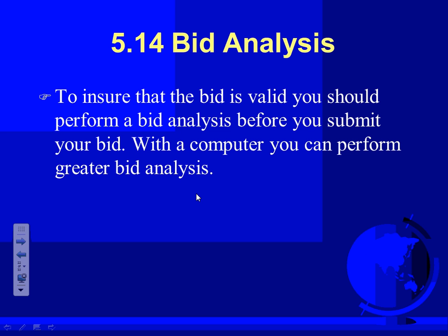Dollar per square foot is a major thing with bid analysis. The sheet that you guys have with us here takes the dollar per square foot, the percentage of the labor, the percentage of the material. At least you need the percentage of the labor, the percentage of the material, and the dollar per square foot. These three things are the minimum that you need to look at when you analyze your system. Say every commercial office building that you bid is $13 per square foot, and when you analyze this bid it came up with 26. Don't you think that there's an issue?